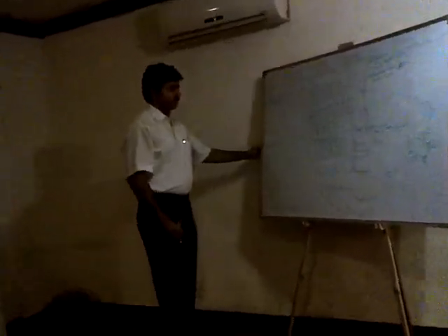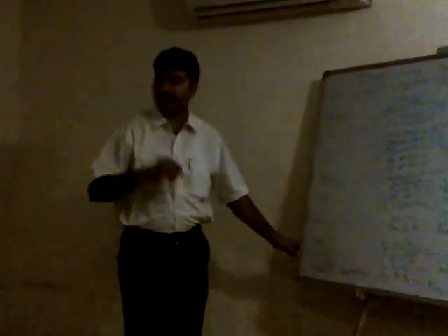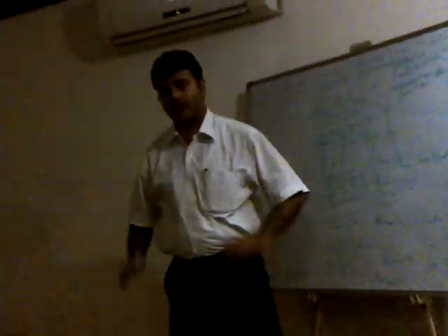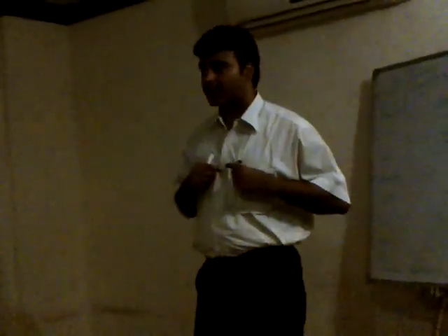Now, for project procurement management, what was the process that we had? It was control procurement. In edition 4, it was called administer procurement. In edition 5, it is called control procurement. The concept is same. Now the vendor is doing the work for us, so we need to ensure that the vendor is doing the right work for us or not. So we need to monitor and control how the vendor is performing for us. Again, the same thumb rule.